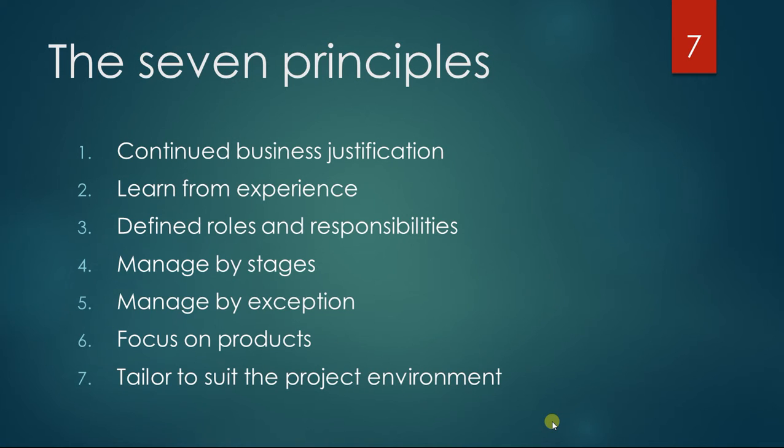You have to ask other people what they have done before, or if you have a corporate log of lessons learned, you have to look into this. For example, if you're doing a certain type of project, there might be certain lessons learned that would be good to incorporate in your project. And then in the documents that you produce, there is a headline saying lessons learned incorporated, to remind you that you have to fill something in there.